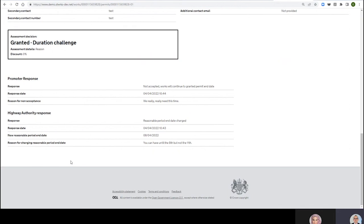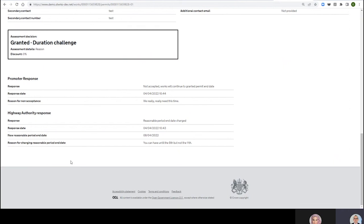The other thing I just wanted to mention is there is that guidance note out there that talks about how you're not required to put in a change request to get your permit end date synced up with your reasonable period end date. It's totally fine to have the two dates be different, but there may be some organizations for whatever reason that prefer to align those dates, and that's a reasonable world as well if that's where you need to live.